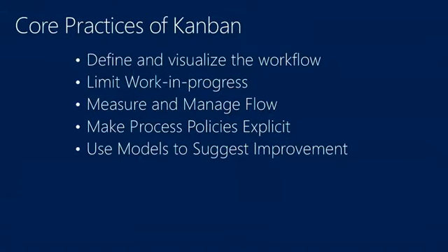So just to review, there are actually 2 core tenets of Kanban. These are the 5 Kanban principles. Define and visualize a workflow. What's really important is the last bullet. So look at the first bullet, define your workflow, forget about the middle 3 for a second, and look at the last bullet. Use models to suggest improvement, meaning changing the process as part of the process.